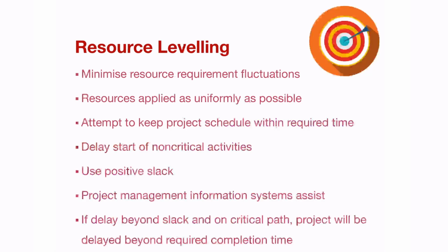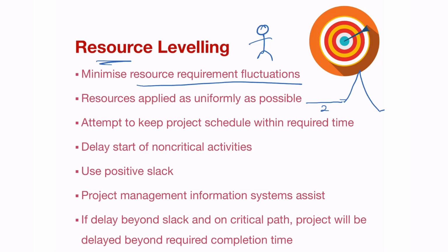Resource leveling is about understanding the resources that you're going to need. And when we talk about resources, we generally talk about people and their time. You want to minimize the resource requirement fluctuations. You don't want a situation where your project is carrying on and you're working with 2 people and suddenly you're needing 10 people for a short period of time.